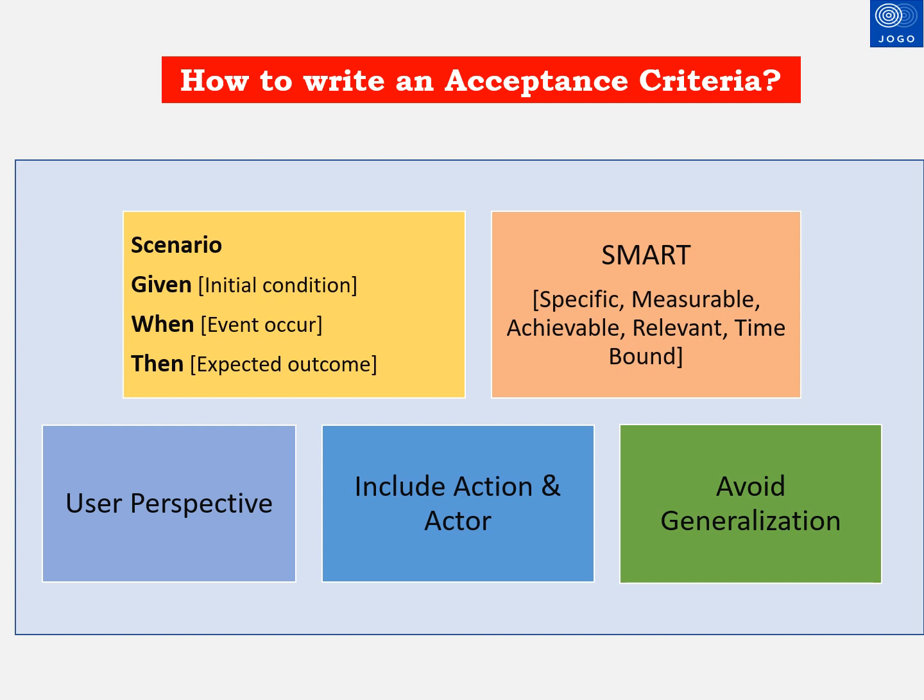The second condition to consider when writing good acceptance criteria is the SMART technique. We need to consider all five elements: S means specific area of product improvement, M means measurable outcome, A means actionable and achievable result, R means relevant, and T means time-bound — that is, the acceptance criteria should have a specific event with a timeline. The user perspective and type of user also need to be captured.